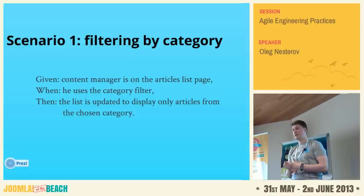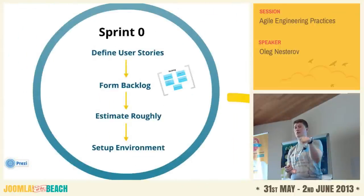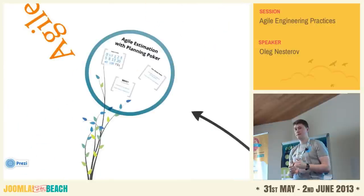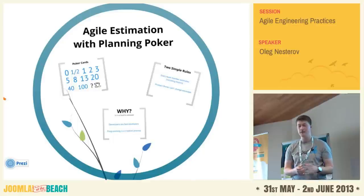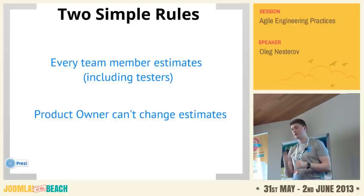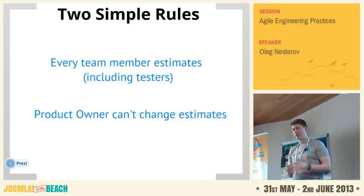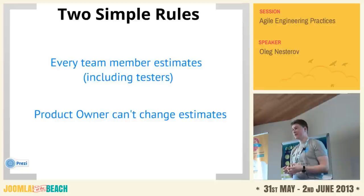Now we have features for the first release — next we estimate them with planning poker. Two simple rules: first, your entire team — each member — should make estimations. In Scrum you don't divide features by developers upfront; that's decided during daily stand-up meetings. All developers should estimate because people get sick or quit, so your team should be flexible enough to cover those losses. QA people should also estimate your features.